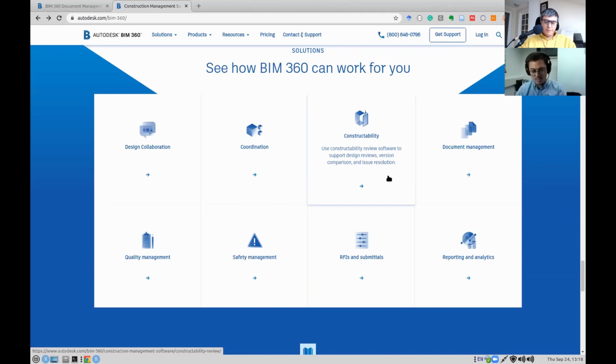So there are some embedded workflows you can predefine and use on projects. The best analogy I can make here is with the areas defined in BS 1192, where you talk about the work in progress area, the shared area, the published area, and then the archive, right? So there are four major areas.